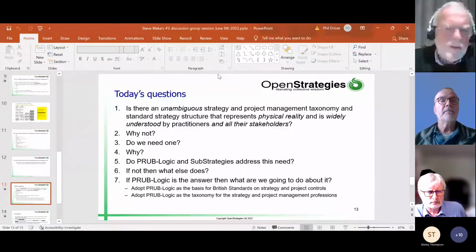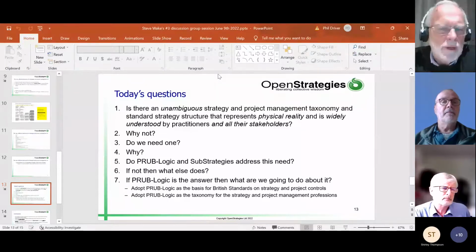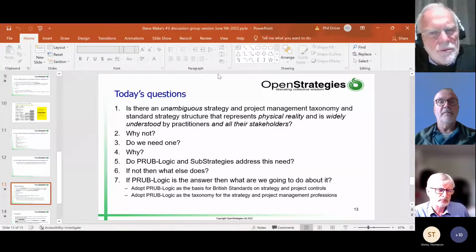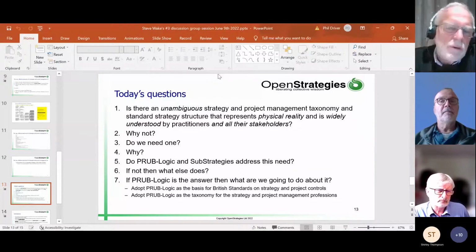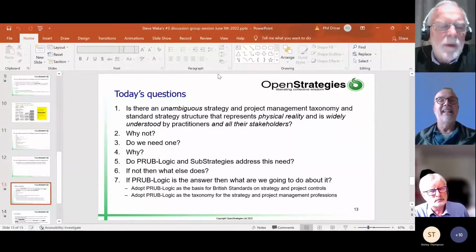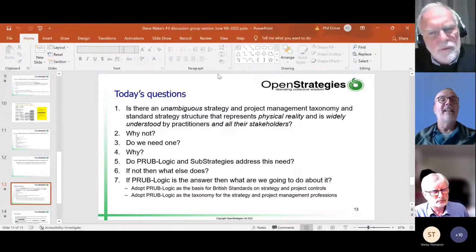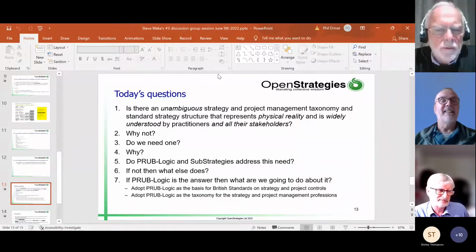No, well, not necessarily. I'll give you an example of a river in New Zealand that was going to be dammed, and it was a river that the whitewater canoeists loved using. And so, of course, they didn't want the river to be dammed. But they managed to talk about it and say, well, what are the uses? And the canoeists said, we want to use the river for canoeing. And the question was, when do you want to use it? And the answer was once a month. So the dam builder said, well, how about we build the dam, and once a month you tell us how much water you want us to release, so you can have grade 1, 2, 3, 4 or 5 rapids, and we'll do that for you. So the goals were completely different for those two groups, and both sets of goals were fully satisfied.